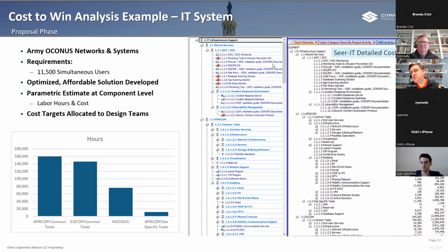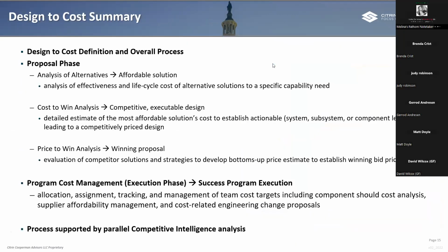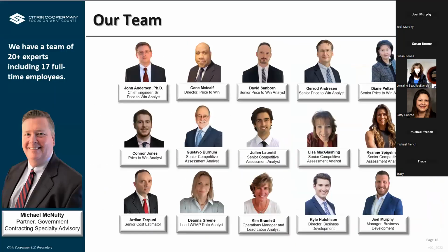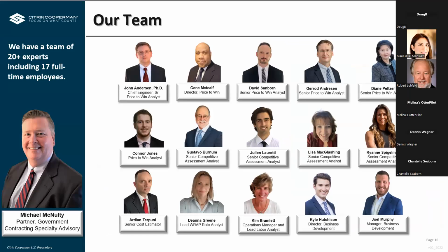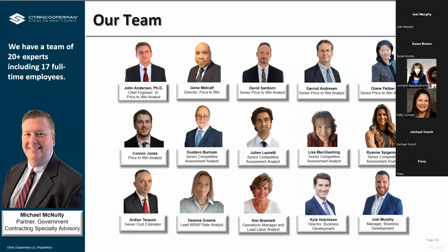Quite frankly, we've noticed the trend lately. We're seeing a lot more RFPs where the inflation is actually dictated. That is a problem. What we have been doing, and it's something to think about, is we have been using higher numbers, certainly higher than we used 5 years ago. We tend to use higher numbers this year and next year, and then sort of go back to more historic numbers, maybe a little lower than historic.